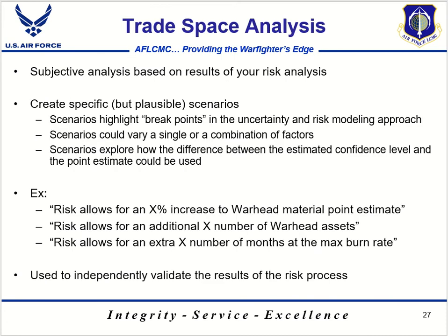And then once you're confident in the results, that things make sense and are realistic, you can work different trade space analyses to show what you might be able to do with the quote-unquote risk dollars that resulted from the risk modeling. What you want to do is develop some realistic scenarios that may occur in the program and then explore how those issues can be addressed with the risk money that the program has. So if the point estimate is $10, for instance, and the mean confidence level is $15, that's $5 of risk money that you want to conduct some trade space analysis on.